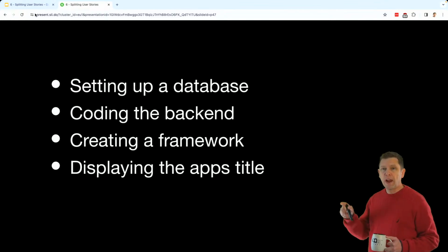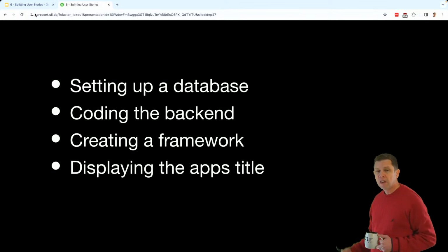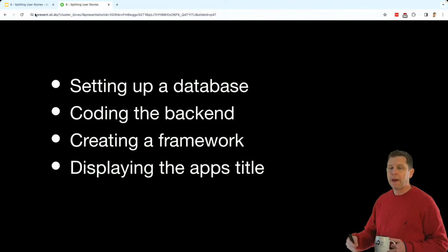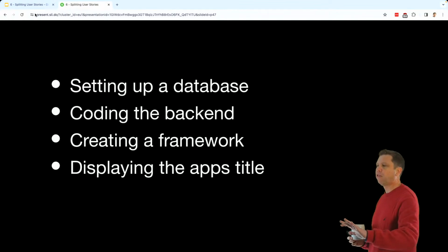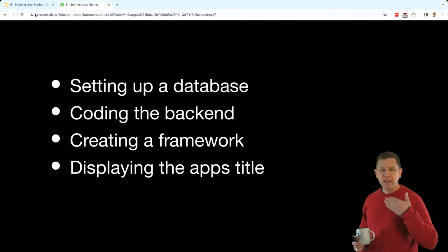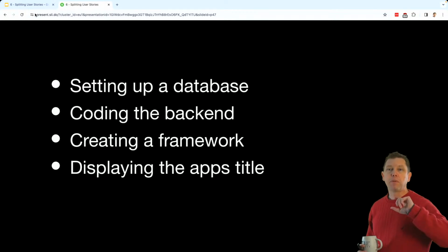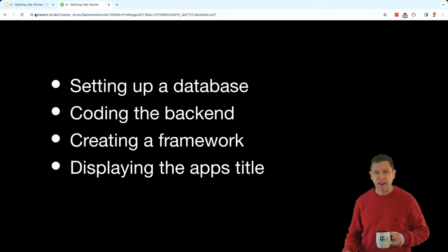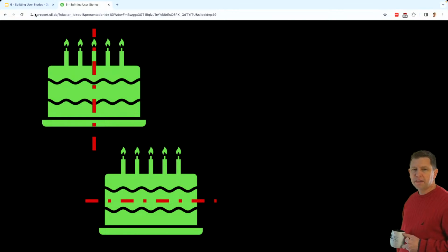But it's built around what the customer will see as being value and what the customer will see as being progress. So if I'm working with a team that's doing a new web app, that's usually the first thing we do. Can we create the title, talk to the customer and find out what they want the title to say on the main page, and let's see if we can deploy that. And let's also see if we can write a test to prove that the title shows up on that page. It gets us very focused on exactly what the customer will see as being progress, and on being able to prove through the tests that the system does what the customer is asking for it to do.